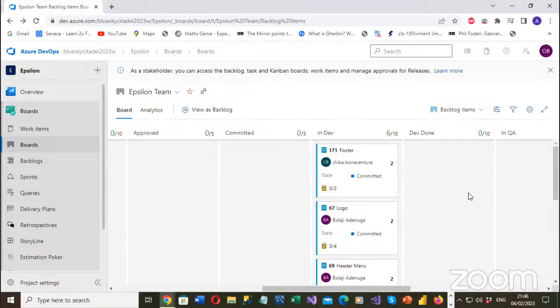And every one of these tasks that you are doing, you need to report and update during the daily stand-up. Oh, yesterday, I started working on my automation test framework. I've downloaded Visual Studio and I've downloaded all the libraries. Today, I'm going to continue working on it. I've also created test cases and I've linked those manual test cases to the user stories. I'll be working on both 50-50% today. That is you've given your update.